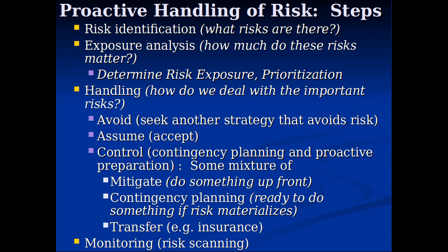So you've got to prioritize. Risk management is not about identifying every risk out there and enumerating them exhaustively and just saying, okay, we're thinking about all of them. It's about taking the ones that are most important, as determined by this risk exposure, probability times impact, severity if it happens. And it involves saying, okay, look, for each risk, how are we going to react to it? We just say, look, we accept this. We accept the fact that it's possible that there could be a catastrophic fire that destroys the Department of CS servers, or there's a loss of connectivity. Some risks we accept.